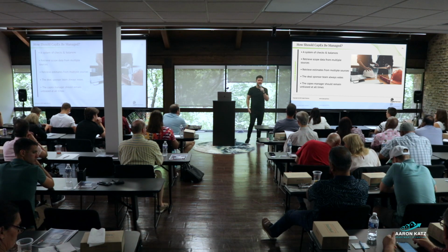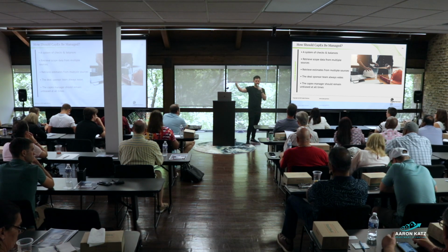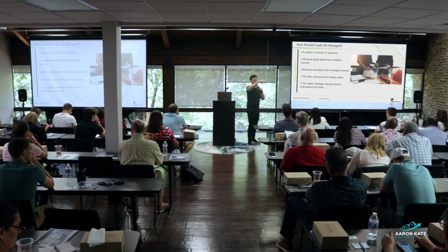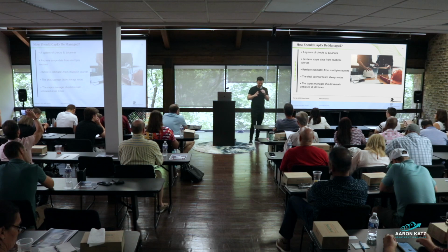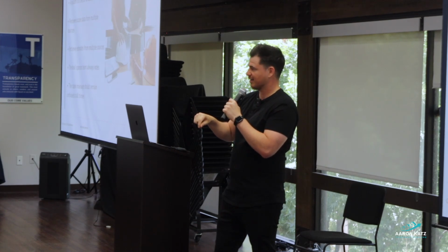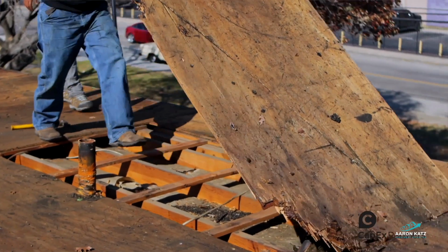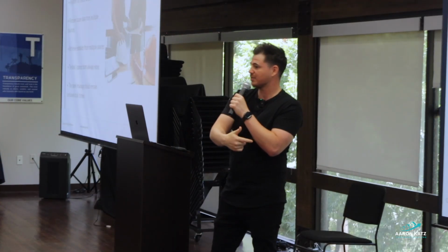What I mean by that is you have to receive bids from not just multiple companies or contractors. You have to make sure you're getting them from multiple sources. Somebody calls me, he says, Brandon, we need 3 estimates. I'm like, all right, I'll have 3 estimates. Now I have the estimates, and I'm the only one getting estimates. Then I could potentially say, hey, I like this guy. And I could call this guy and go, hey, here's where you need to be to win this job. I can finagle that to where the guy I want to win wins the job. And if they ask about the other 2, oh, don't worry about those other 2.